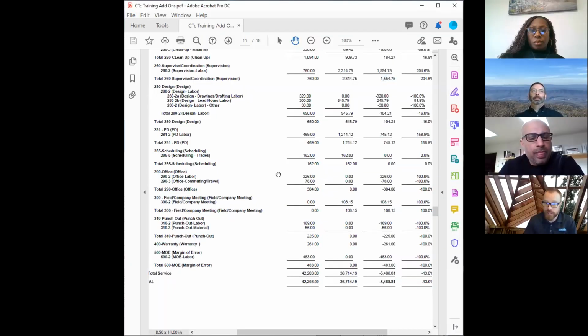Another pitfall that I see, if you go back to share that screen, Mark, of things that I note when I look at job costs that are pretty easy to pick up, is line items that had nothing in the estimate but have dollars coded to them. That could be whole categories, or individual line items. So right there is a field meeting. Typically you wouldn't put a field meeting towards a project, so that would be something that I would circle.